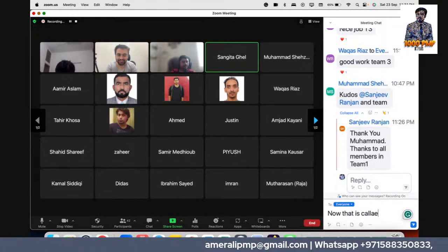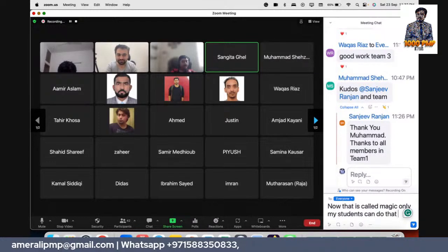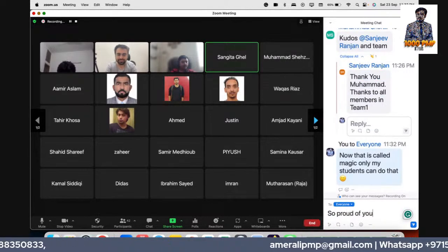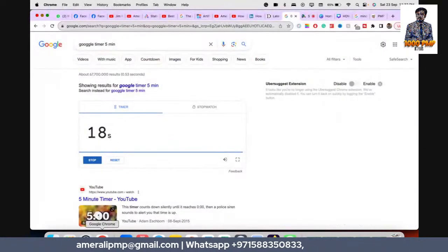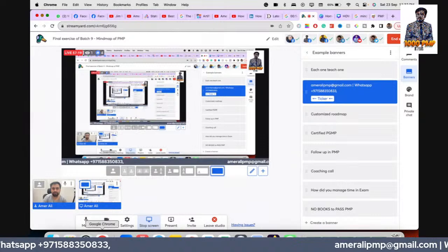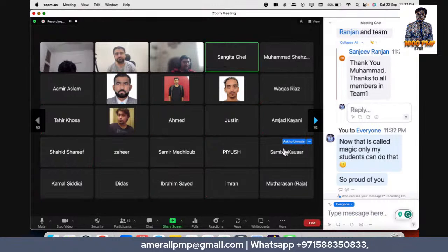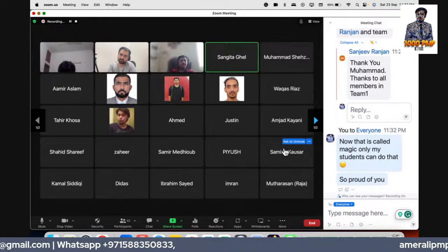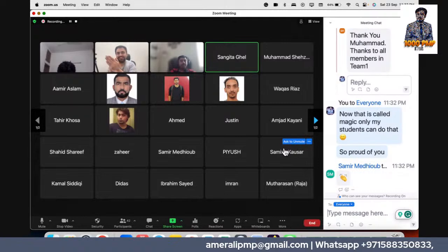In the quality management plan, we have quality metrics. Next is manage quality, where we have an audit and check the effectiveness of the process. Next is control quality, where we inspect the deliverables and then validate them. The tools we use in control quality and manage quality include checklist, check sheet, audit, inspection, sampling, statistical attribute sampling, histogram, Pareto diagram, control charts, and root cause analysis.